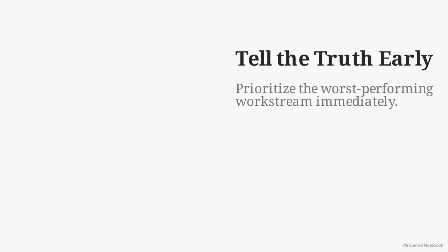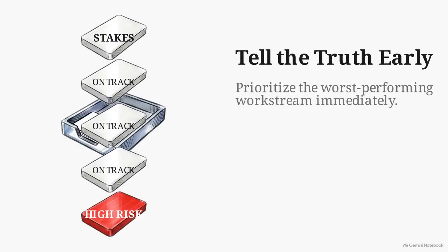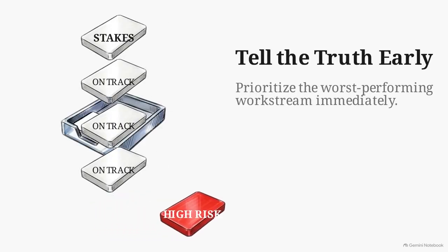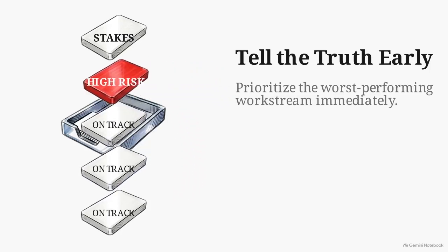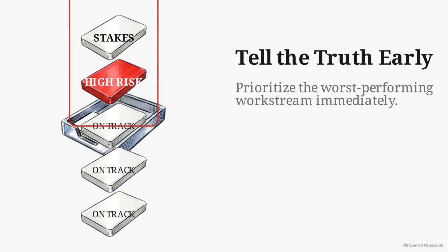Next is T. Tell the truth early. Take your slide deck and reorder it by risk severity. The worst performing item goes first, regardless of where it sits on the actual project timeline.